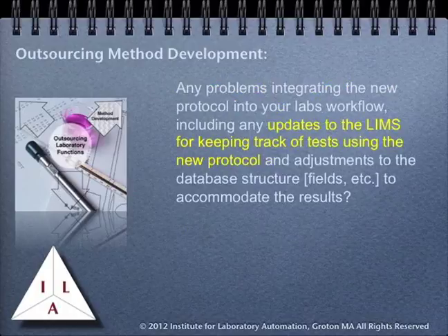You also have to factor in the fact that this new protocol is going to impact your laboratory information management systems or electronic laboratory notebooks. Adjustments may have to be made to databases to incorporate new test elements in any supporting fields that they require. The cost of doing this should be factored into the overall project cost. The contracting vendor may provide some assistance on what is necessary.